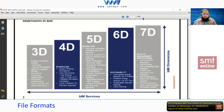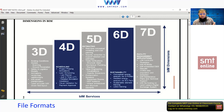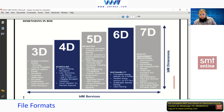As engineers, you know up to 3D, but in BIM the concept extends to 4D through 7D. 4D means 3D plus project scheduling. 5D is 4D plus project estimation. 6D refers to 5D plus sustainability — LEED, green building, value engineering. 7D is 6D plus project maintenance and life cycle of the project.